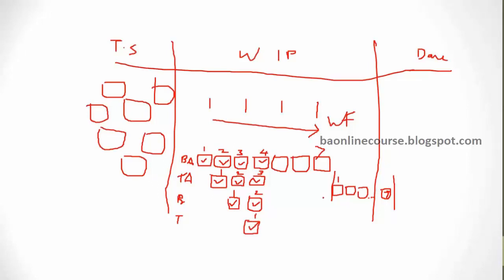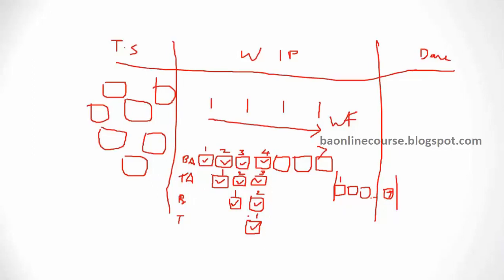So this way, you're reducing it from 4 months to maybe 1 month, 2 weeks or so, since nobody is sitting idle in this process. You get the benefit out of this. You understand what the benefit of this model is. We are moving from a sequential model to a simultaneous model. So instead of completing all 7 requirements and then moving to analysis and design, you are doing it one requirement at a time. This is the approach which is taken.